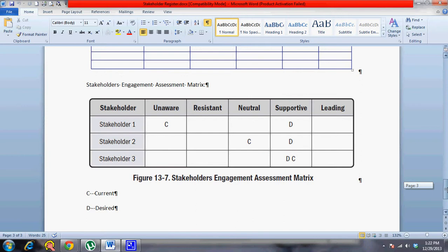So the stakeholder management plan deals with seeing who are the different stakeholders identified as part of the stakeholder list, then grouping them, having a strategy to deal with them, and how to communicate project decisions at different points, how to handle communication if there is any friction in terms of sending sensitive information, how will that be handled.